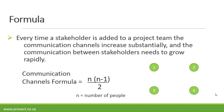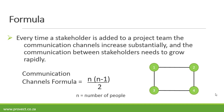Now let's take a quick example. Let's say we've got four people in a team — how many channels are there? Counting them out: one, two, three, four, five, and six channels between the four individuals. Let's verify with the formula: n is four, times four minus one which is three. Four times three is twelve, divided by two is six.